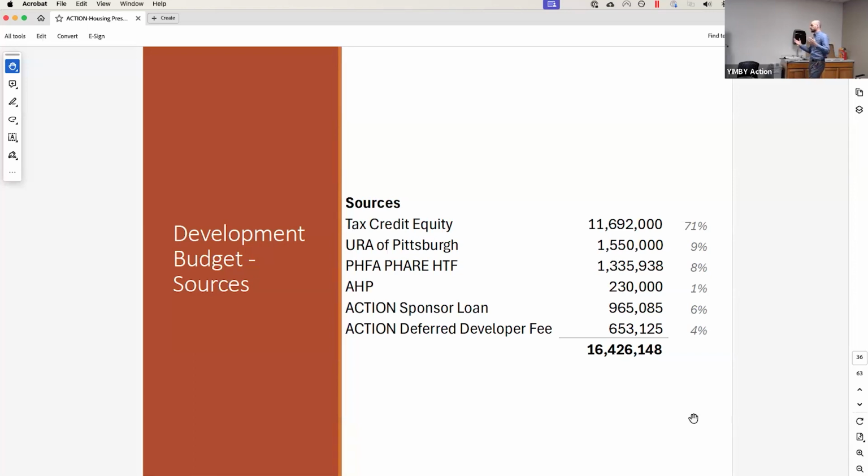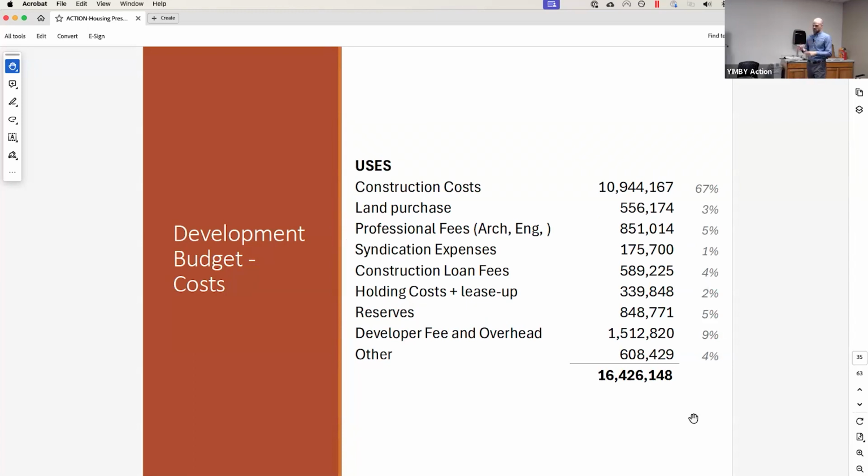So you saw huge increases in concrete, timber, any framing. We had a change order one day that was $75,000 just out of the blue for the same stuff. We thought that was crazy. Fast forward a year, and a similar project was getting 3 times that, just because of fluctuations in materials costs. Right. I mean, kind of market rate for 100% affordable.